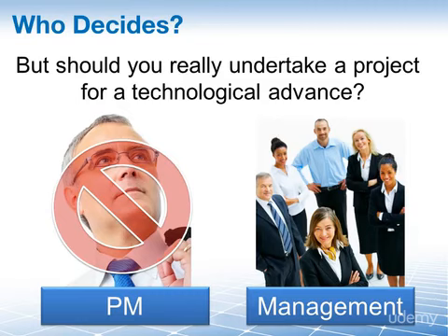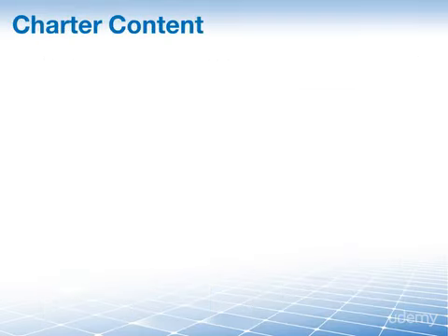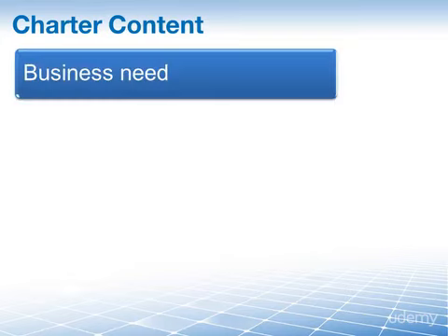This is a management function that is usually supported by a selection process with all kinds of criteria. It's not the project manager who gives his or her okay to new projects. It's management who decides. Once the decision is made, you will be chartering the project, but you don't decide on the project. Actually, in some companies, that doesn't happen right away. In some companies, you will first execute maybe a feasibility study or some sort of similar analysis, and then you charter the project. No two charters will look alike, but there are a number of standard items on them. Let's take a look at a few.